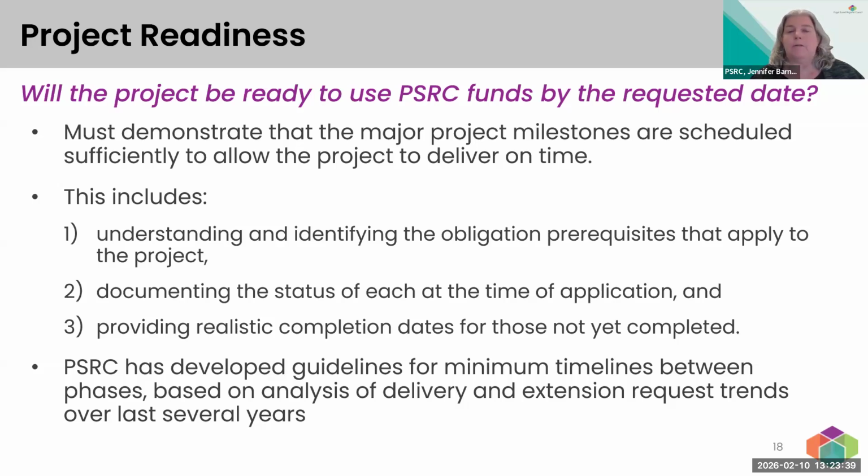So if a project is, say, requesting construction funds in 2028, we need to know all of the milestones leading up to that 2028 construction date so that we can determine that the project schedule is realistic and that those funds could realistically be expected to be obligated by that date.